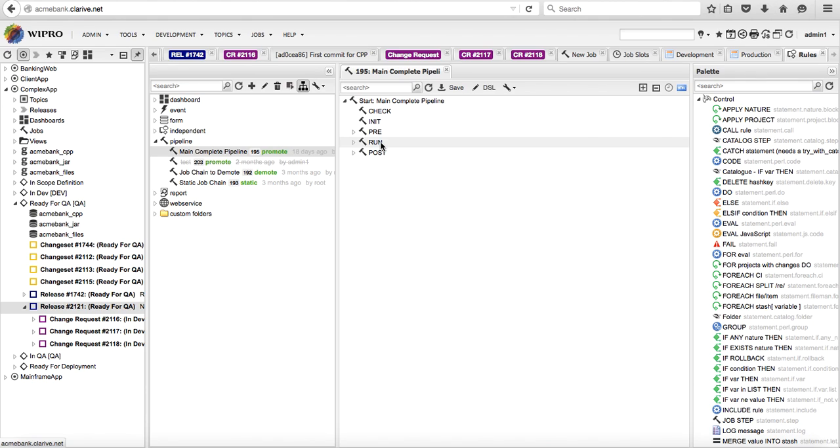Since this is a limited window, we want to limit the run step to the actual deployment, and prepare as much as possible for the deployment in the pre step. In the pre step, we build our applications. We make our binaries and executables, so that in the run we just have to deploy the binaries, the WAR files, to the target environment, and we don't lose time compiling and building applications.